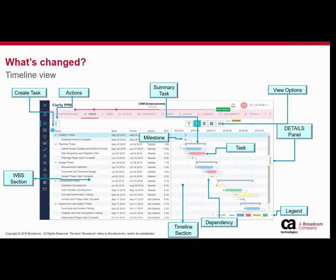Going from the two different panes: the left pane is the WBS section, where you see all your tasks — if there are summary tasks you will see those as well as their subtasks. If you have multiple levels within a summary task you will see all of those levels in the WBS section. The right is your timeline section, where you see the same corresponding tasks as timeline bars, with the bar length representing the duration of that specific task.